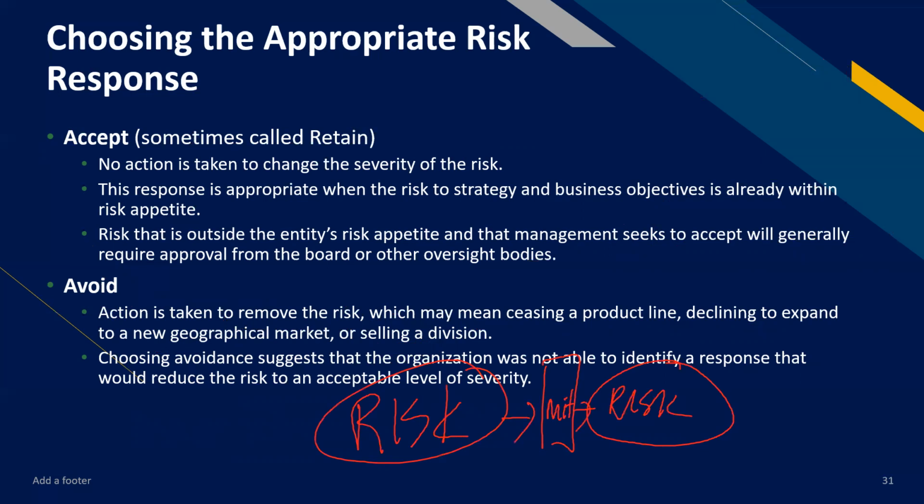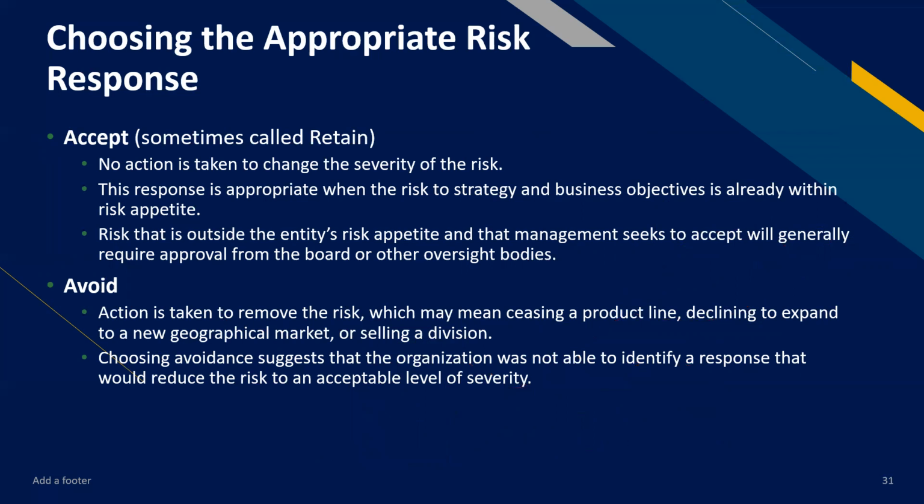And probably, this mitigation is so expensive, right? That it's not worth it to pay for this just for a minimal decrease in the severity of risk. So probably the most cost beneficial is to avoid it altogether. No? So that's one generic response. Okay.